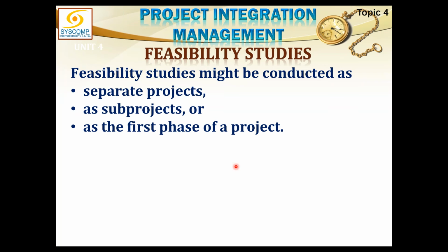There might even be a pre-feasibility of a feasibility, whether the feasibility study should be carried out or not. Because the feasibility study itself will cost about 1 to 2% of the total project cost. That is a huge money as far as such a big project is concerned. Therefore, even the feasibility study is going to be very expensive. So you first conduct an in-house pre-feasibility study, whether we should be going for the feasibility or not.